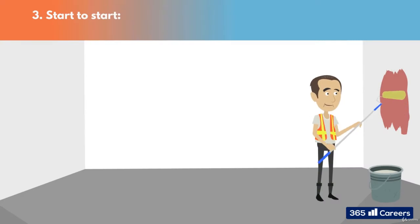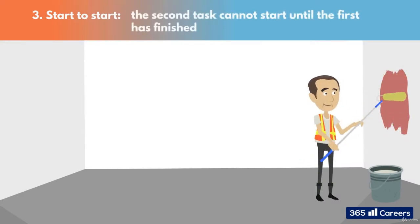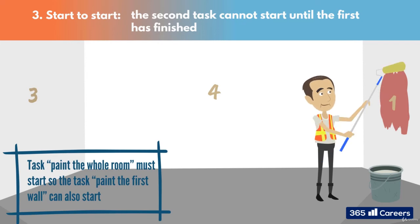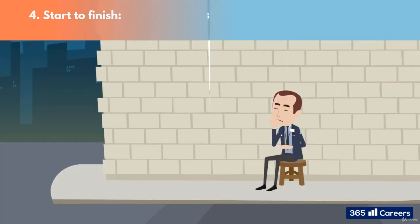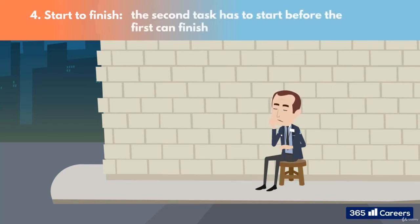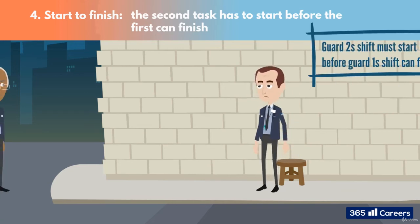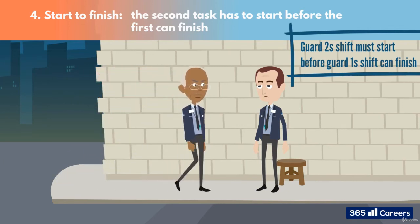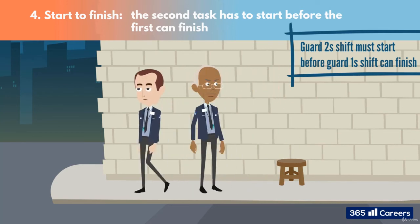Third is start to start, where the second task can only start when the first starts. The task 'paint the whole room' must start so the task 'paint the first wall' can also start. And lastly, the not-as-common start to finish, where the second task has to start before the first can finish. Let's imagine the construction site needs 24-hour security: Guard 2's shift must start before Guard 1's shift can finish, so there will be no interruption in the surveillance for any thieves to sneak in.